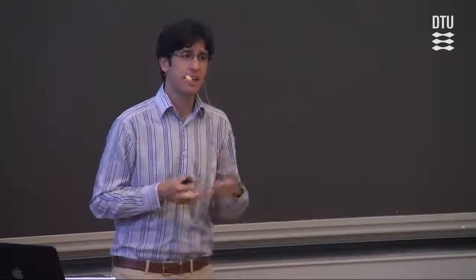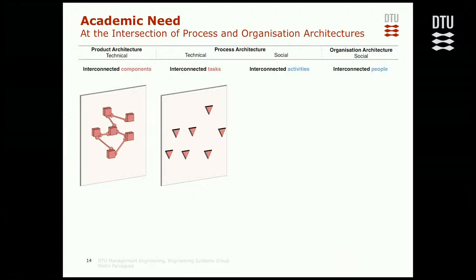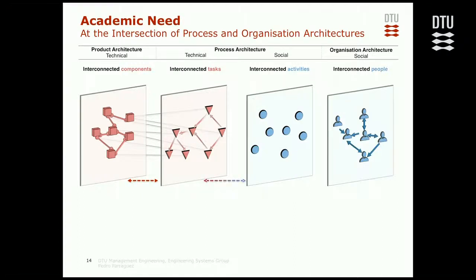As I also said, there are many interdependencies between these domains. To formalize them, I start with the product architecture — we can see interactions between components. We also have a set of tasks that allow us to define, evaluate, or manage the parameters of those components. A priori, we don't know the interdependencies between these tasks. But we can map each task and their parameters to particular components — once mapped, we can infer and explicitly calculate what the information dependencies on the task side are. There are already frameworks that work in this way.